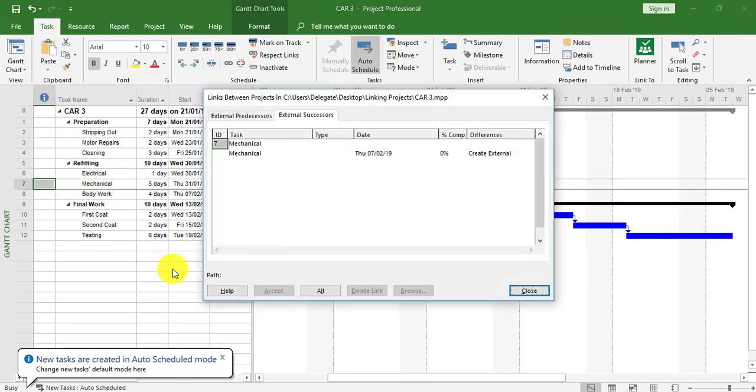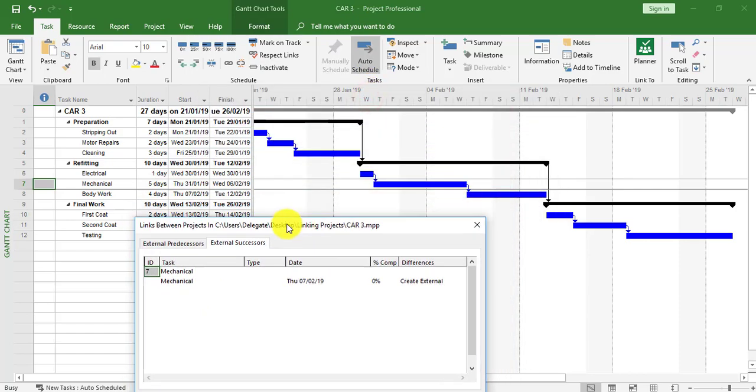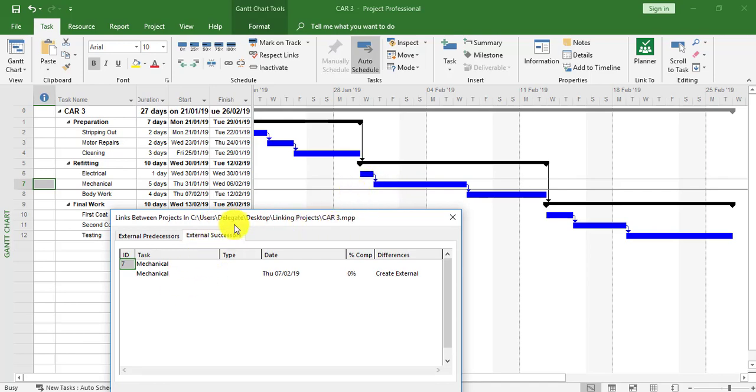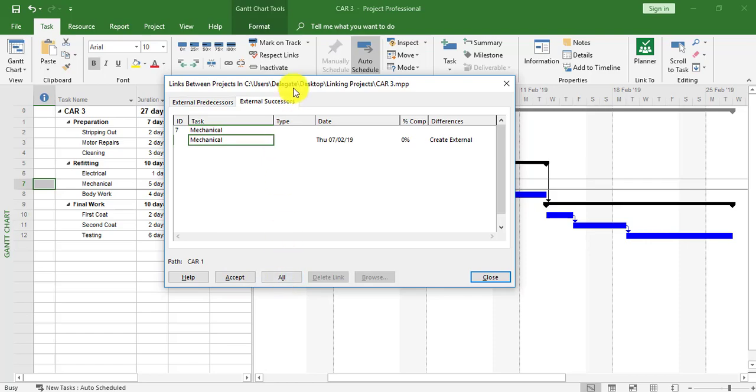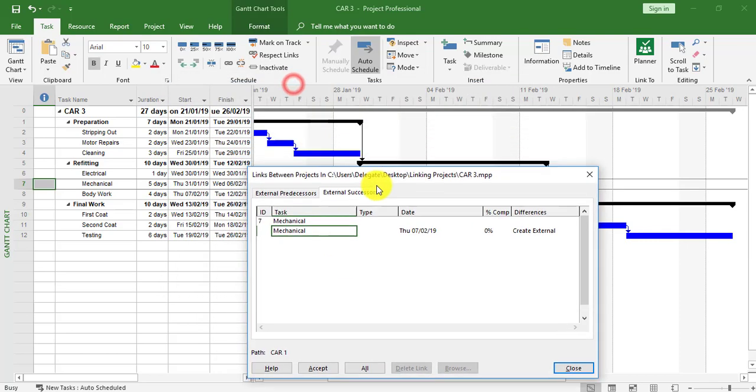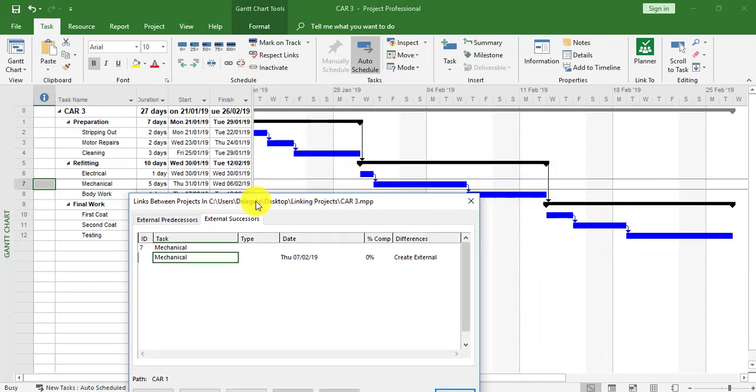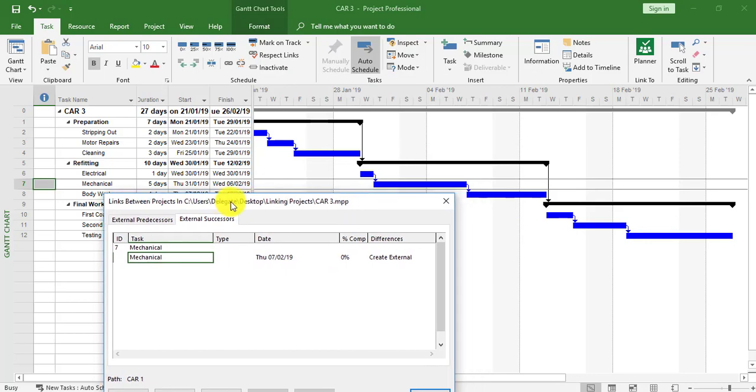This now tells me I'm in Car 3, but Car 3 is saying it hasn't accepted the link yet. I need to update this project through the Link Between Projects box which has now appeared. I'm going to click on the mechanical and now Accept All to accept all of them.